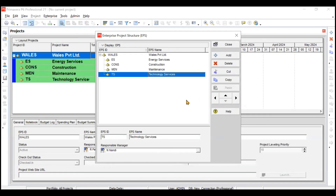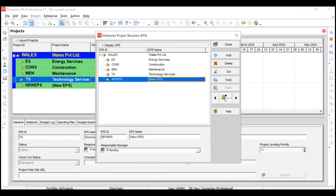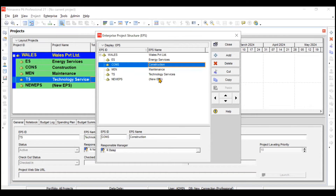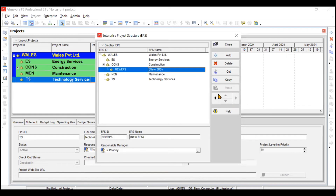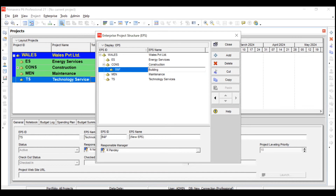If you want further sub-EPS, click Add and use the arrows to position it. For example, L&T Construction has divisions inside the construction sector like Buildings and Factories, Wastewater and Effluent Treatment, and Transportation Infrastructure. You can click the arrow to place a new EPS under Construction and assign it — for instance 'B&F' for Buildings and Factories. We are deleting this example as it is not in our current scope.